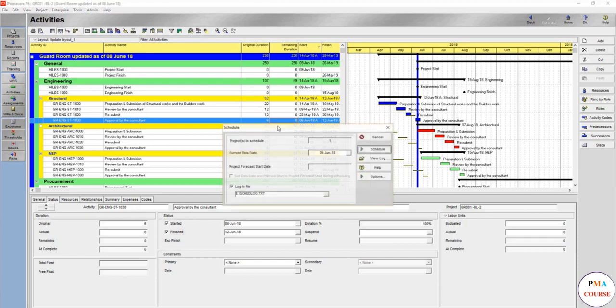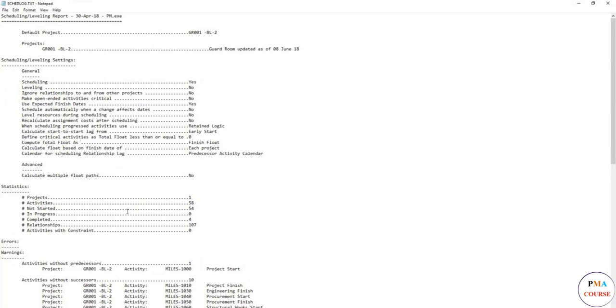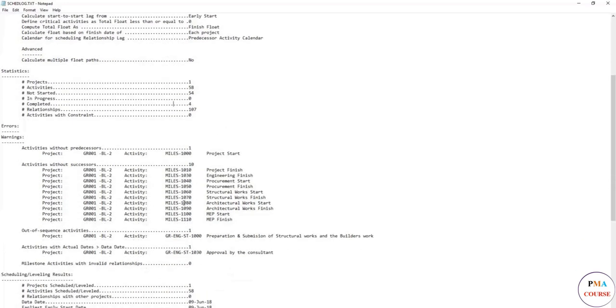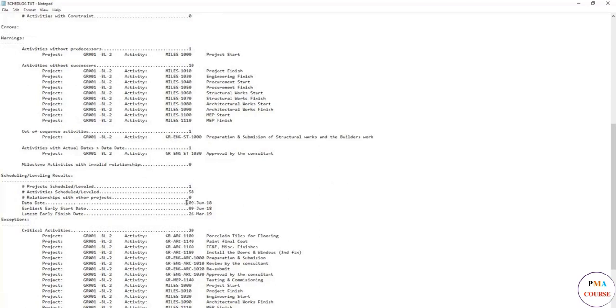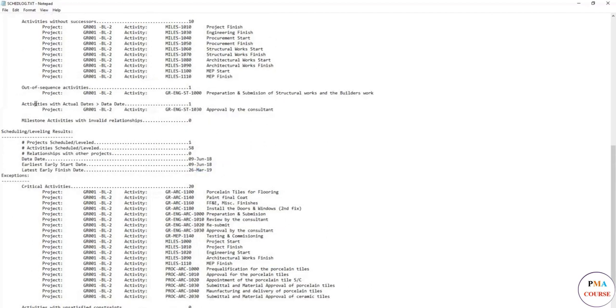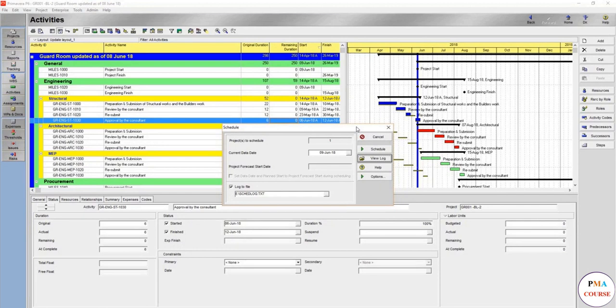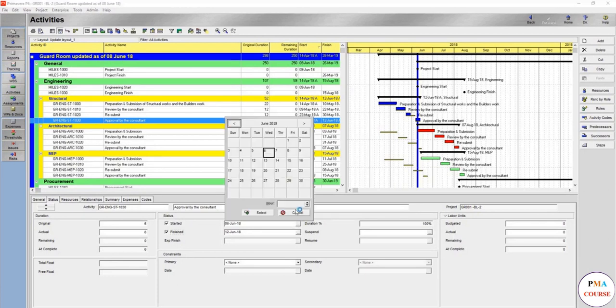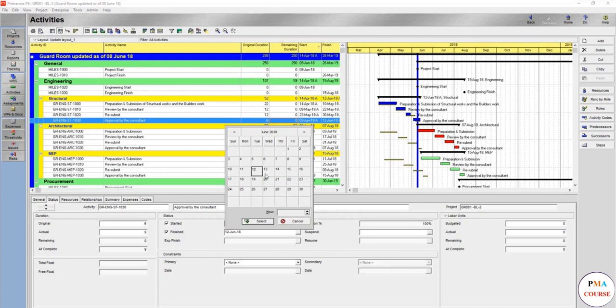What do you think is wrong here? We have made an activity finished before the data date which is wrong. So let's view the log. There is an active item that will show here. 54 activities updated, not started 54, 58 completed. Errors: activity actual dates more than data date one. This will show you that something is wrong because you cannot predict that it's actual. It will finish 12 June is still a prediction.